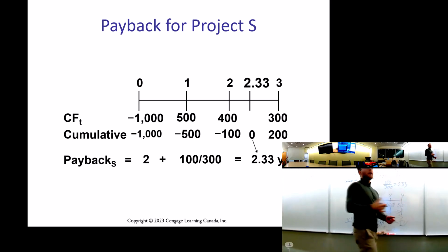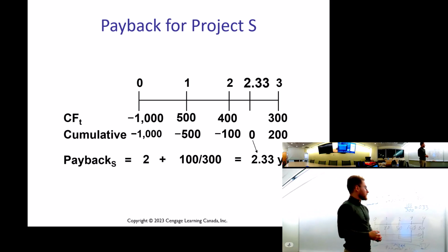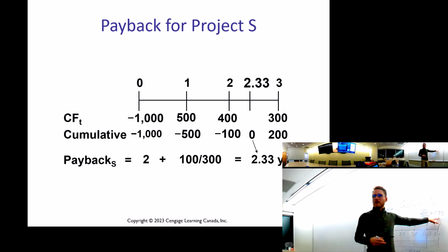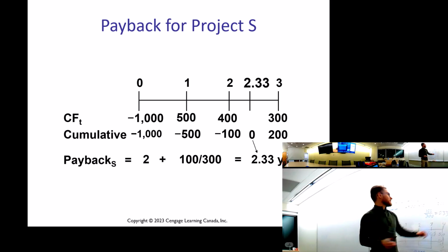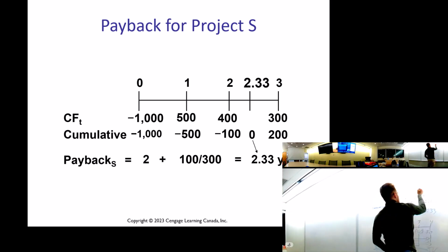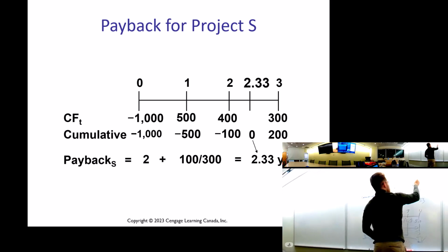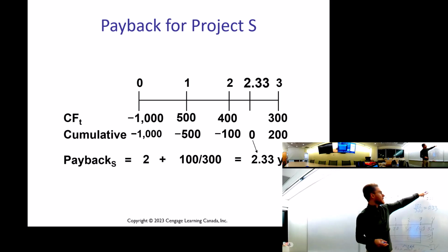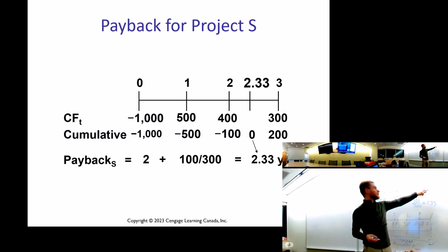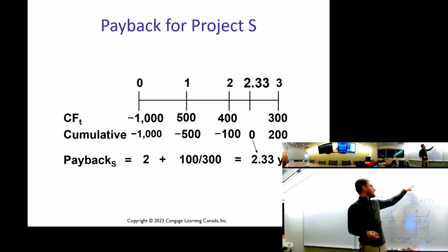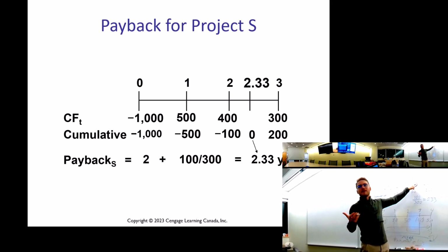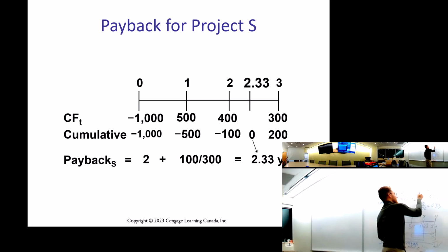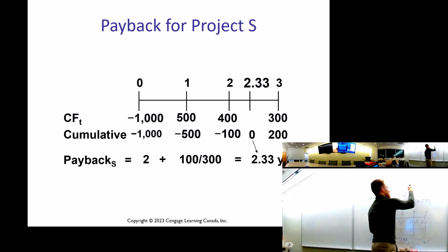Well, what's 0.33 of a year? It's 4 months, right? So if I were to put this into, like, say, a rate of cash flow, I'm assuming here that every 4 months I get $100, right? So here I got $100, here I got $100, and here I got $100. I add 100, 100, 100 together, I get that 300. So therefore, as of 1/3 into the year, I basically earned back my project because I had a deficit, and at that point I earned $100.